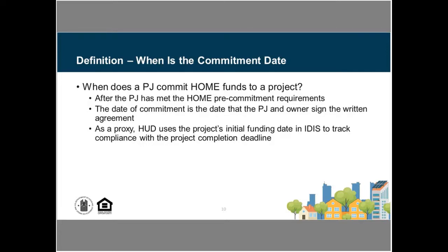But when it comes to determining, so did you meet that deadline? Did you miss that deadline? We would be using the actual execution date for that written agreement rather than the setup date within IDIS for that project.